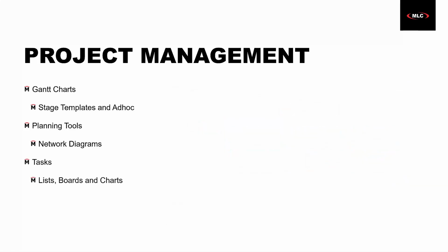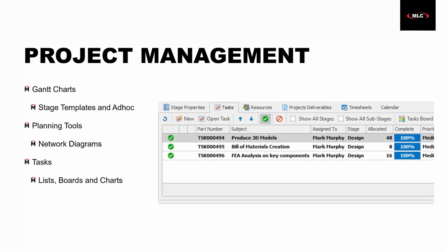I mentioned tasks, and tasks are definitely a big part of the project management capabilities of Manage. Within those templates, we can build tasks to automatically be assigned to certain resources for specific stages with set allocated time. And we can create new tasks as needed, right? And the cool part about that is depending on the time we allocate to these tasks, we can have it automatically recalculate the duration of a given stage.